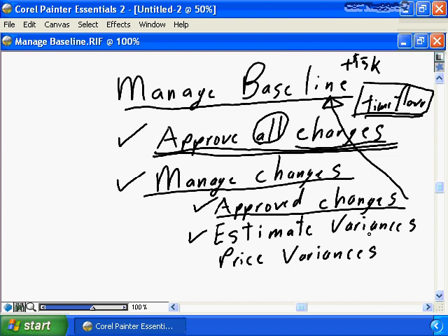Hopefully over the life of your project, you will have some plus estimate variances, where it's taken more time to deliver your project, i.e. therefore more dollars. Hopefully you will have some minus estimate variances where you were overly pessimistic with the development of your estimate and it took less time, therefore less dollars to deliver the project. There will be some give and take with the pluses and the minuses. You need to understand what the net of the pluses and minuses are going to be, and alert management, alert your sponsor that says, there have been problems on my project as a result of bad estimates. And there's no shame in saying there were bad estimates.